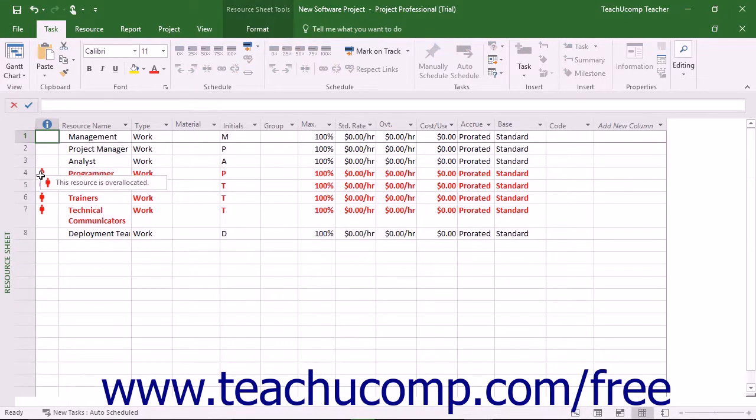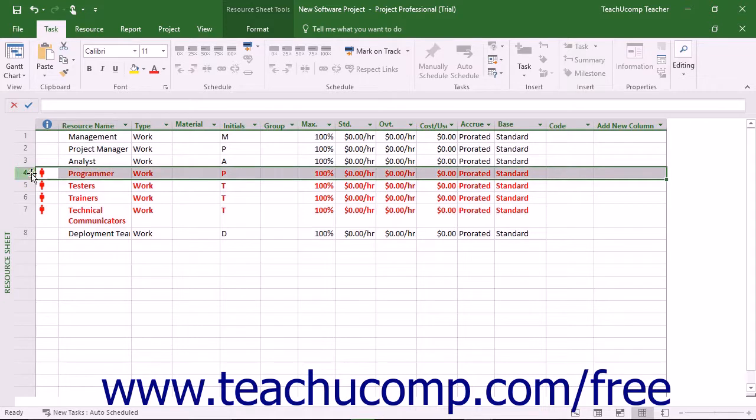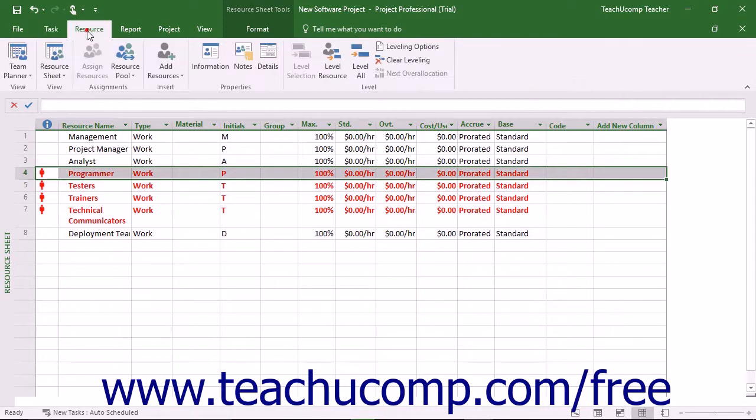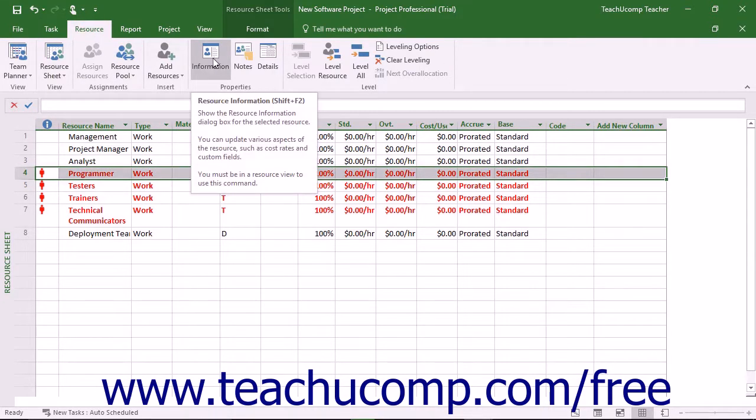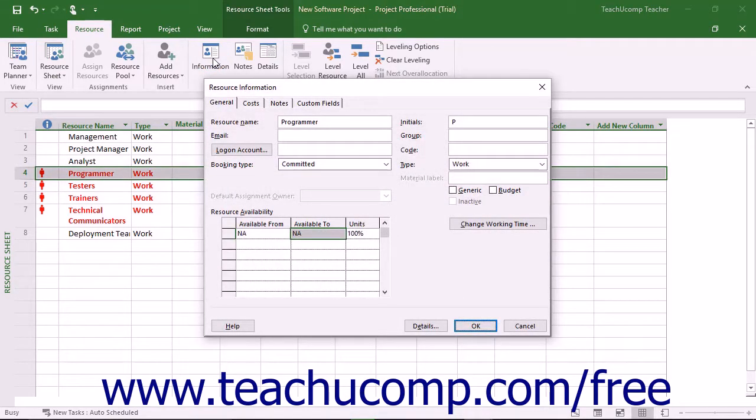Select the desired work resource whose resource availability you want to change from the listing shown in the Resource Sheet View of the project file. Then click the Information button that appears in the Properties button group on the Resource tab in the ribbon to display the Resource Information dialog box.